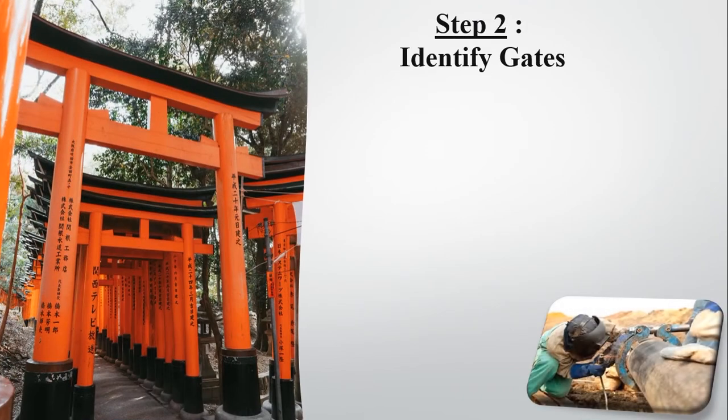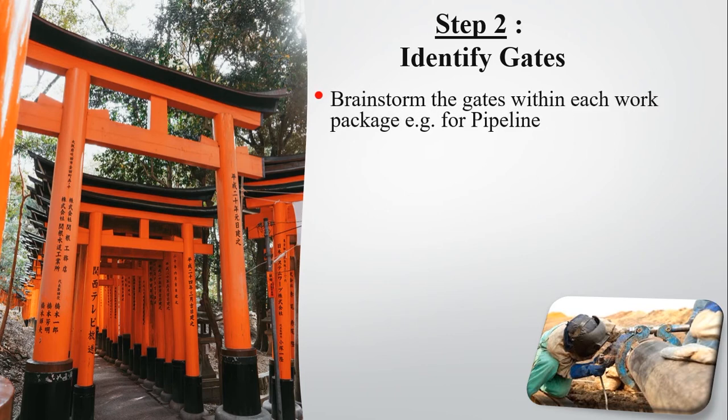Gate 2, we identify the gates. So again, the brainstorming process is telling us that, through that critical path activity, we're identifying these key milestones that need to be looked at. We're identifying key deliverables that fall out of that critical path that we have to flow down. And through that, immediately, we're sussing out from that what our gate profile potentially will be. And here I'm giving you typical examples or indicative. You can build up in terms of what your program is, what your plan is, what your project is. You don't have to follow this, but I'm giving you that.